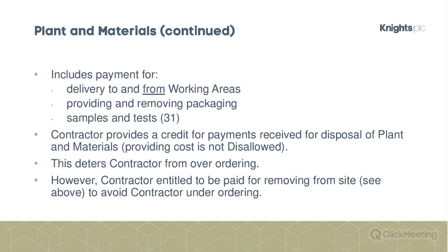Okay, so plant and materials. Some sort of miscellaneous items. It includes payment of delivery. As with the equipment, it covers payment for delivering to and from the working areas, removing packaging, sampling, testing.